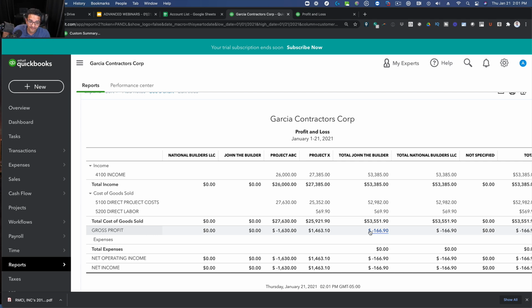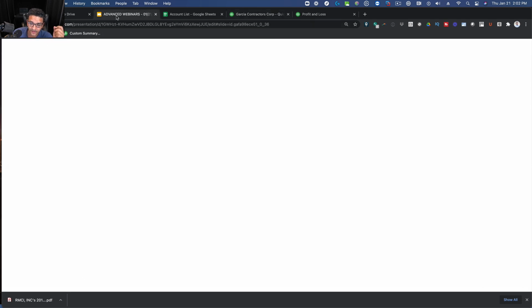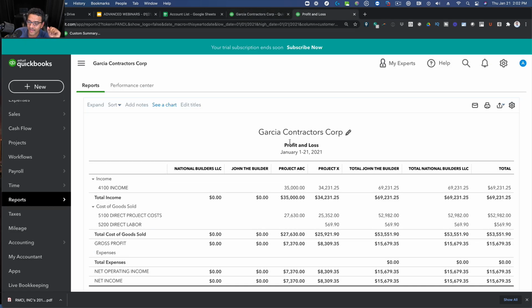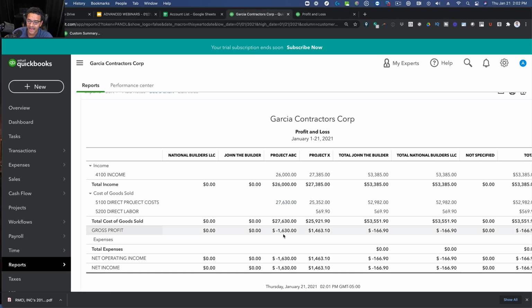You're following every single step, right? You're not missing a beat here, okay? If you do that and you remove just that markup item, and every one of your other items ties in to the actual expenditure that you have, and because we're doing the bundle where we're hiding those details from our customers, but we are including them on the invoice, you will actually know from this report how much over and under you were for each one from the original estimate.